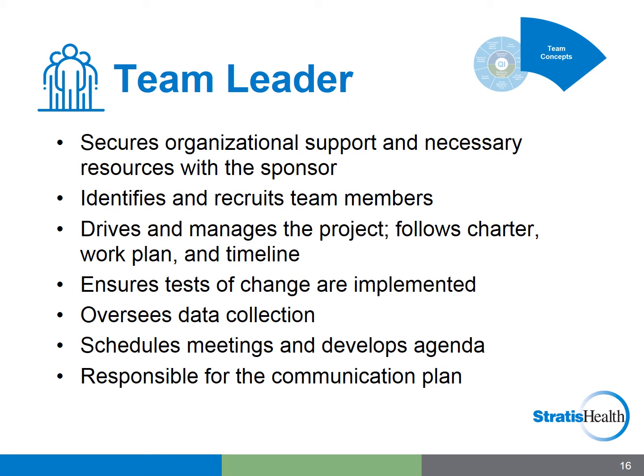The team leader provides guidance and direction for the QI team and secures organizational support and necessary resources with the project sponsor, identifies and recruits team members, drives and manages the project, follows the project charter and develops a work plan and timeline, ensures tests of change are implemented and oversees data collection, schedules meetings and develops agendas, and is responsible for the communication plan and ensures necessary communication outside the immediate team. We'll take a look at a sample communication plan in this course.